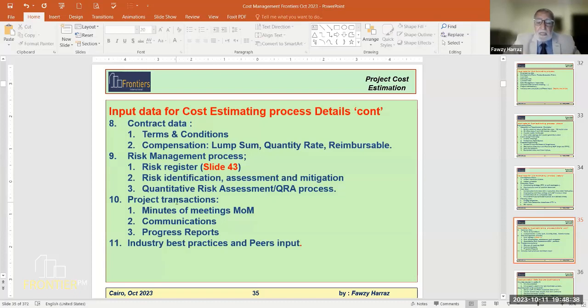The contract administrator or QS, quantity surveyor or whoever, will take note of things that involve scope changes in one way or another, and start preparing a change order based on this. And if that idea is good, then the estimator will dig into which quantities and which costs are involved.